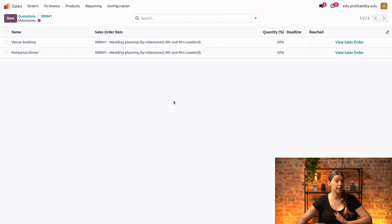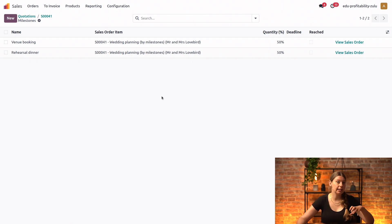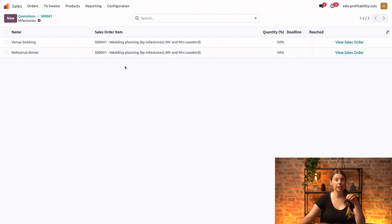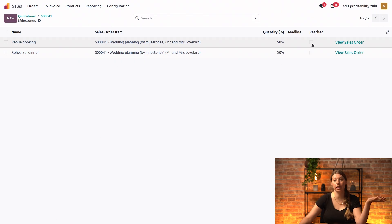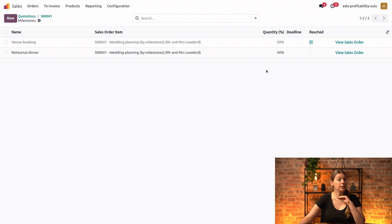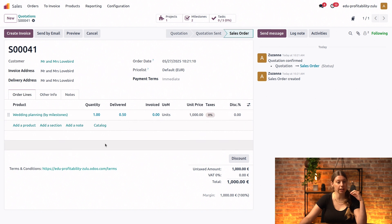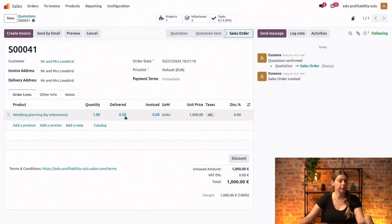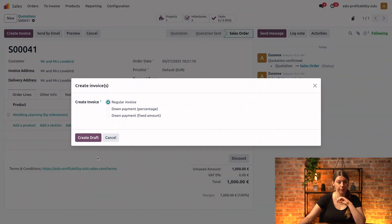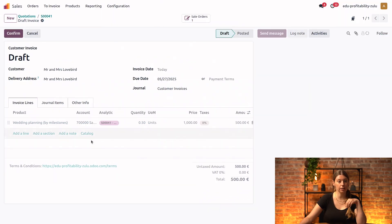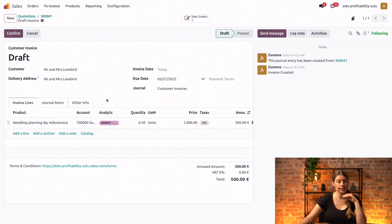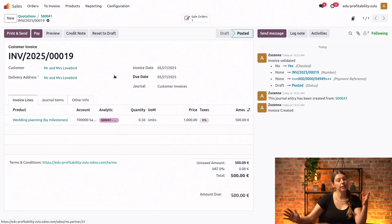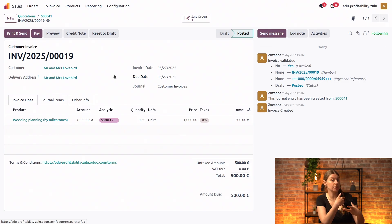And now that this is done, I can mark those milestones as reached. And again, I can also go ahead and link tasks to certain milestones like I did in the previous case. But here, I will just go ahead and say that I have already reached the venue booking milestone. Perfect. And once this is done, if I now go back into my sales order, I will see that my sales order line has changed. So you see here that my quantity is always one. But in delivered, I already delivered 0.5, so the one milestone that I have split my work into. And if I wish to do it, I can now create the invoice, regular invoice, and I can create a draft. And we see that I can now invoice my customers to 500 euros, which is half of the initial price. I can confirm. And then my customers will pay me the 500, and I can continue funding of the project. So I can continue to invest in whatever I need.